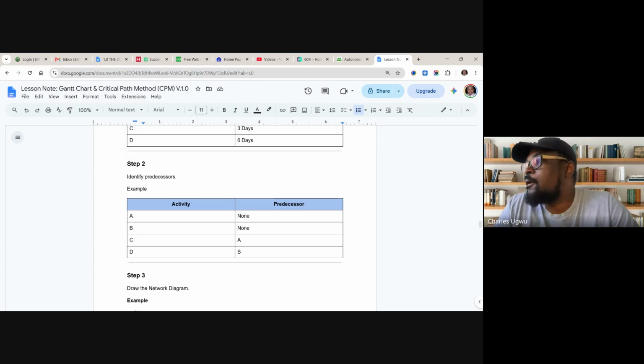If you go to our work breakdown structure, you can identify some activities that can actually stand on their own. Activity like risk management or RAID. So you can start your risk anytime. You can even start it from day one, because risk is everywhere in a project. You can also decide to wait till there are activities before you start your risk management.